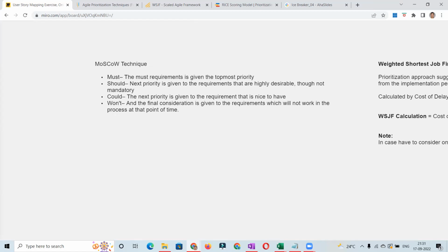Sometimes we add blank fields to the UI and say that entering the data in these fields, or integration with a third party, will populate these fields. But for the time being, we are just doing the UI bit. So there is always a way. You just need to figure it out.